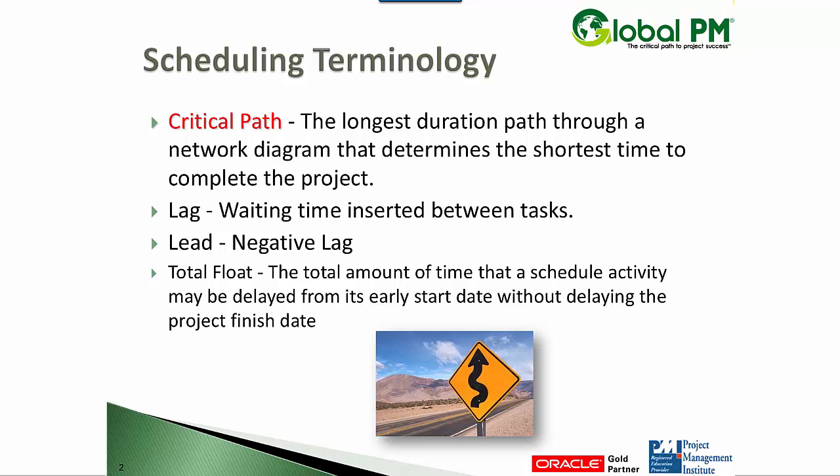That's critical path. Lag: this is a directed delay in the start or finish of a succeeding activity. For example, if you pour slab, you may insert a five day lag for cure time. That's one way of reflecting that delay in the schedule. Some people might also have a separate activity for cure time.